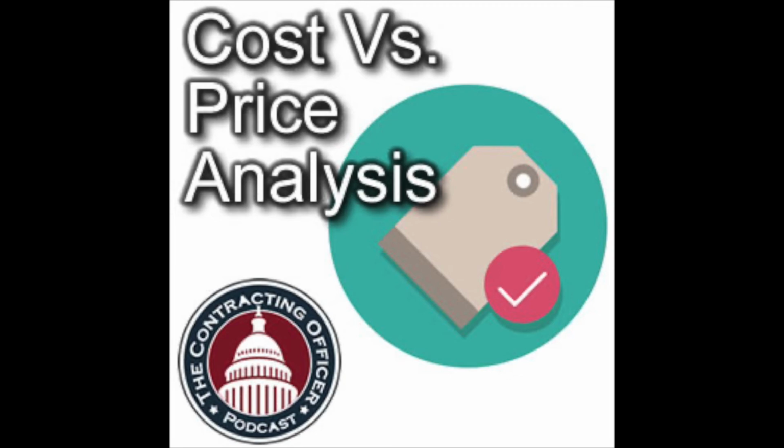And then in the execution time zones, you're going to be in the performance zone, because you can be making changes to the contract that are going to impact price. And so you're negotiating, how do I know that this change, we're increasing this technology, we're increasing this number of units, we're changing their production line, whatever, has an impact on cost. And so understanding just enough information to make this a fair and reasonable price to change the contract. That's going to happen during the performance zone.